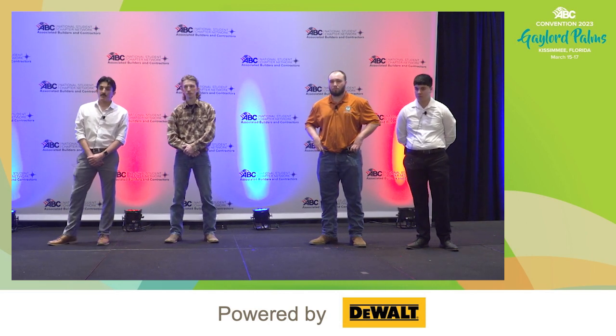Thank you. A quick question on self-perform. So in the response, you all plan to surpass the 5% minimum, but can you elaborate on what scopes you plan to self-perform? Correct. So we plan to self-perform all foundations, slab on grade as well. With our past experience in concrete, we believe that it'll add quality to the project higher than other trade partners that we work with.